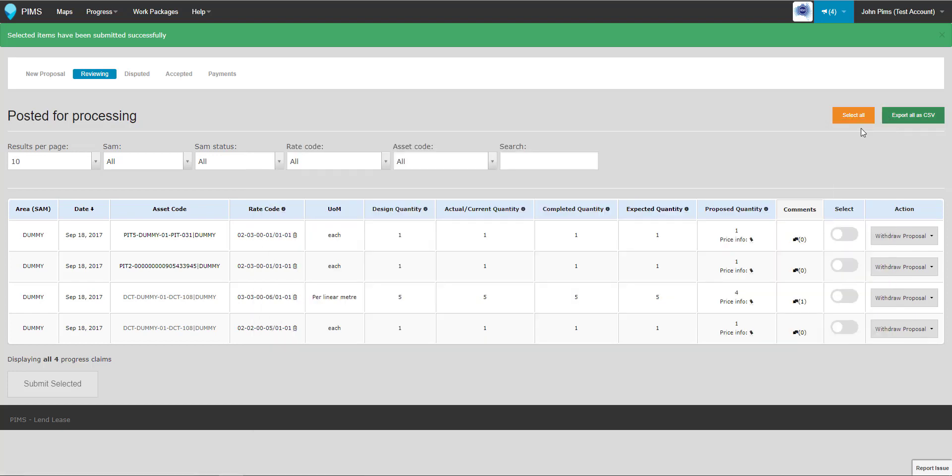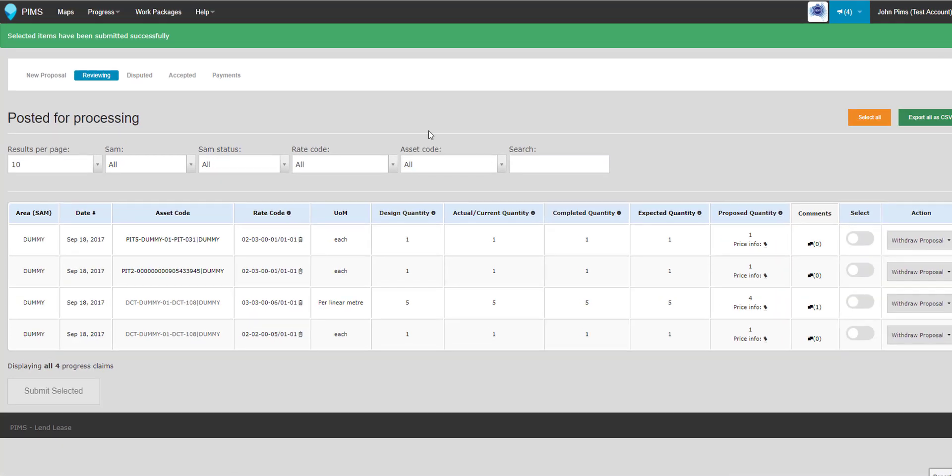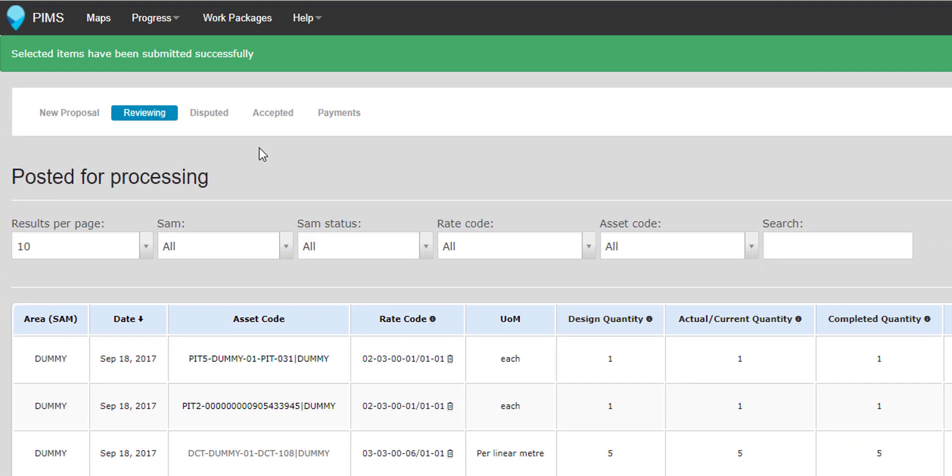After review, your progress proposal will either enter the Accepted state, or if there are incomplete documents or forms, a conflict with proposed quantities, or other parts of the progress that require further discussion, it will be returned as Disputed.